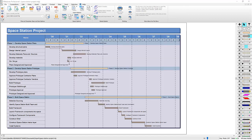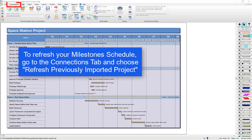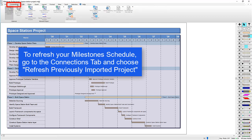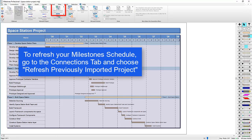To refresh your Milestones Professional file, go to the Connections tab. Then choose Refresh Previously Imported Project.